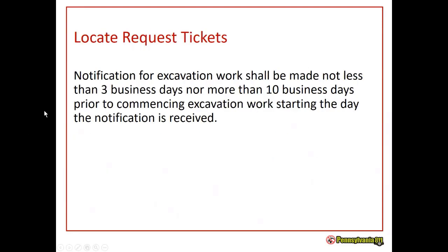Now, our routine ticket. When you're planning your excavation, there's certain things you want to remember. Mark the area in white. This is going to help the locator find the exact location where you are working. They have a lot of other tickets that they have to do during the day. So giving them that exact location information and marking it in white really helps.